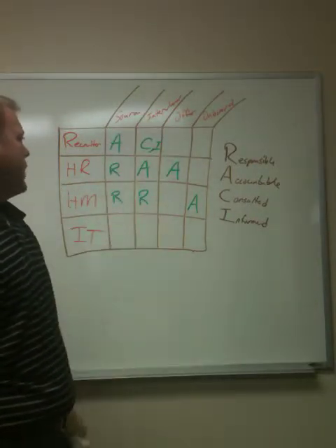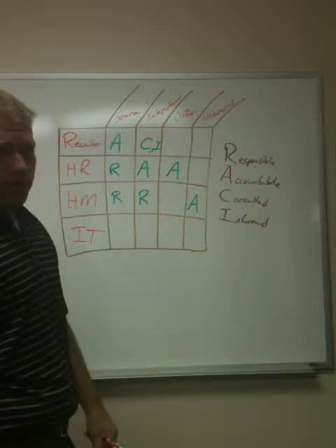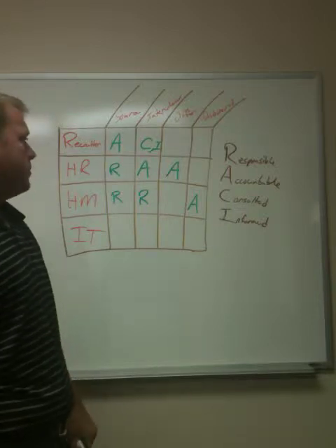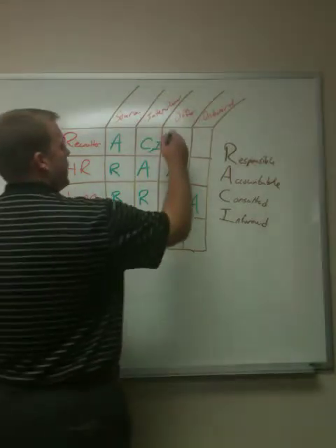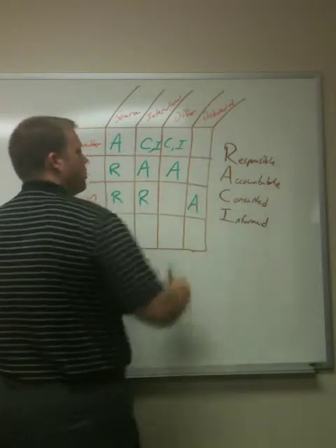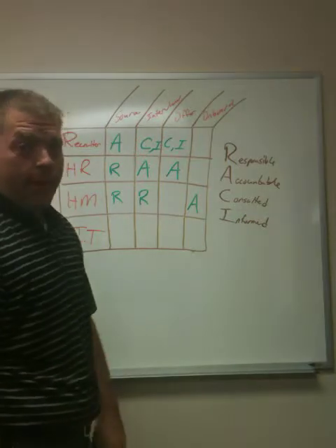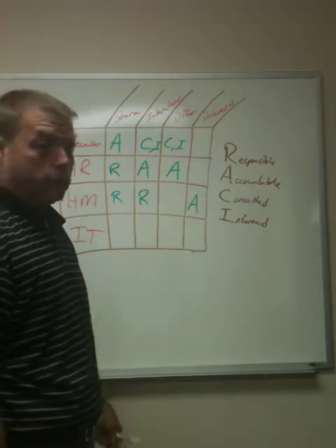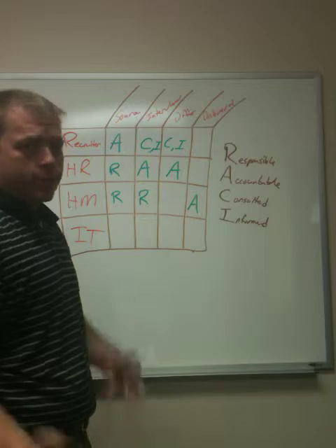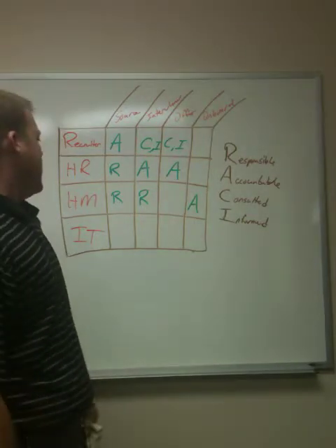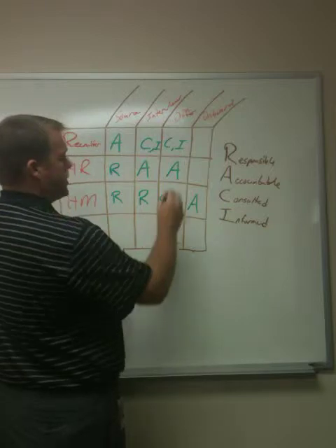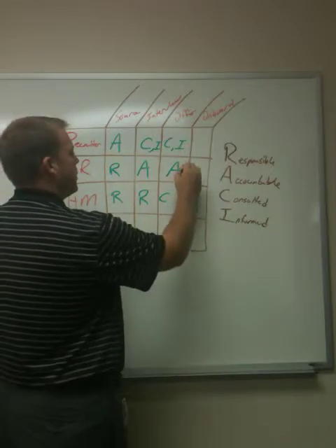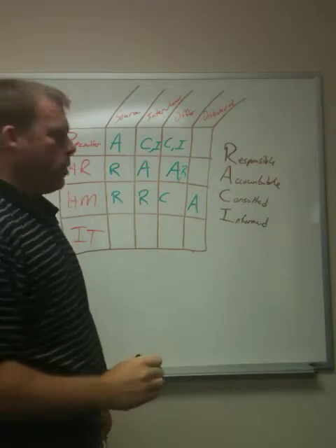Then we go to the offer stage. The recruiter, they're not responsible for it. They don't do offers. At least not in this example. We're going to leave that to HR. But we do want to consult and inform them. We consult them so that we get any information they might have. We inform them so after the offer's made, hopefully they'll stop sourcing for that job, unless of course you have another opening. Hiring manager is consulted, for sure. But we're going to say that HR is actually doing the work on this. They have the A and the R.